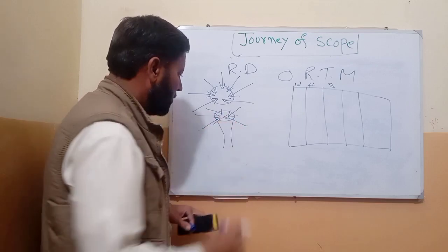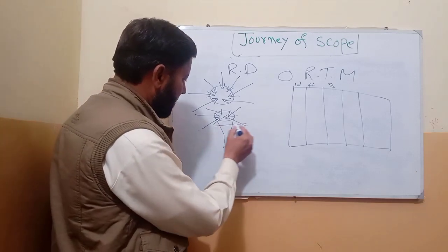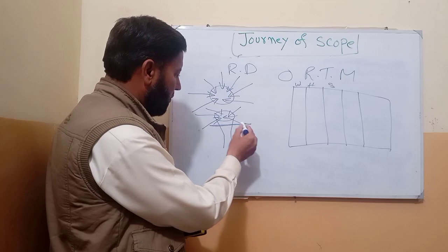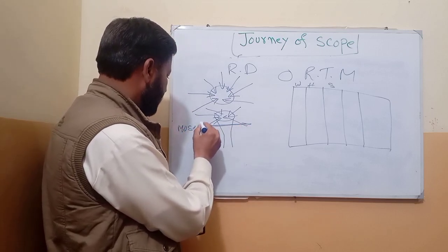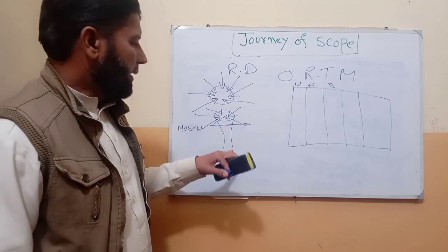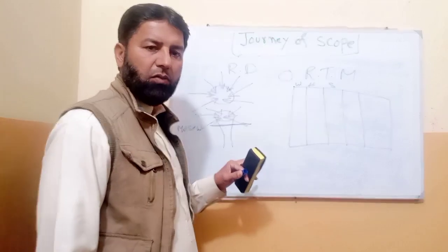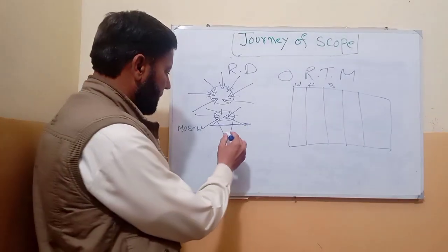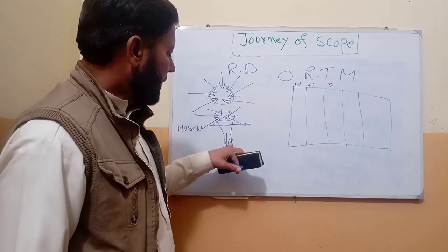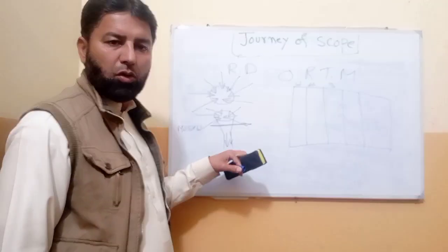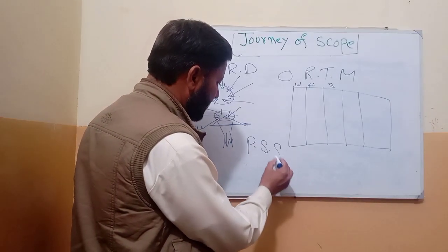Then we use a filter here, which I will call MoSCoW: must have, should have, could have, would like to have, to separate the product requirement and project requirement, and we will put these requirements into a document we call the project scope statement.